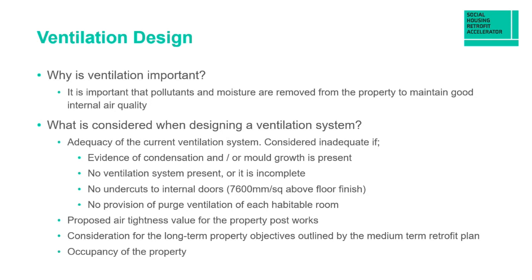Under the ventilation design and strategy, there might be a proposed air tightness value for the property post-works. So if that's designed in as part of your strategy, then again, you need to make sure that air tightness test is carried out at the end to demonstrate compliance. Consideration needs to be made for the long-term property objectives as outlined in your medium-term retrofit plan. And as I've mentioned previously, the occupancy of the property needs to be taken into account.